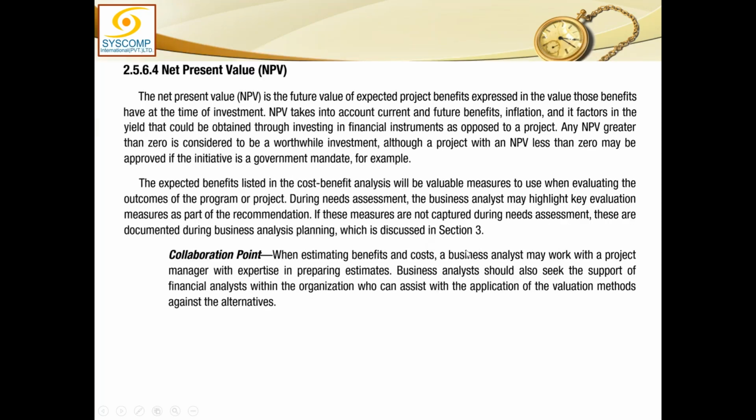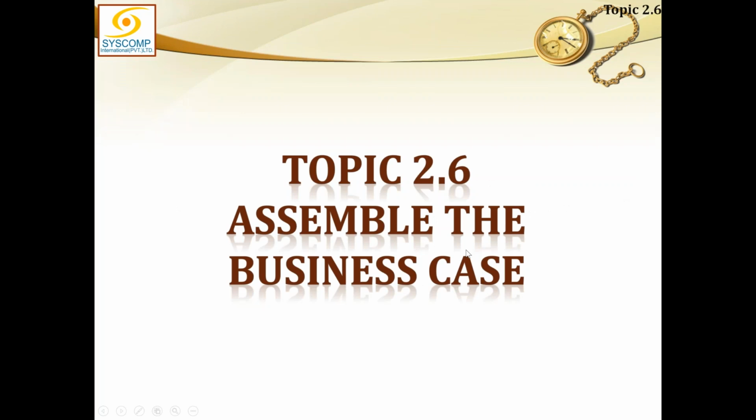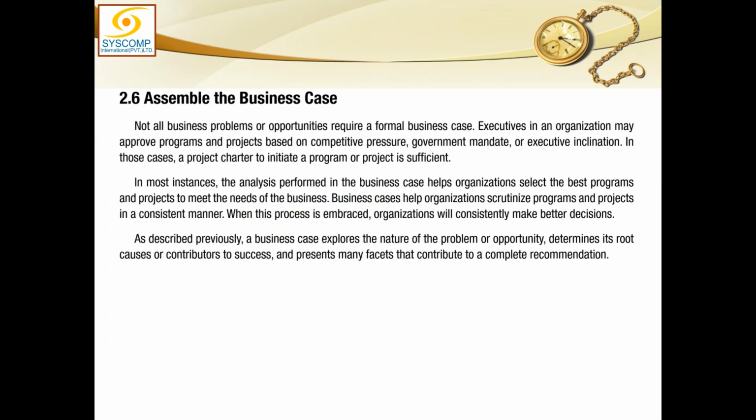Okay. Let's move on to 2.6, that is assemble the business case. Now that you have all the ingredients, you have done the analysis, you have done all the calculations. Now assemble the business case. Not all business problems and opportunities require a formal business case. This we were talking yesterday also. Executives in an organization may approve projects and programs based on competitive pressure, government mandate, or executive inclination. In those cases, a project charter to initiate program or project is sufficient.